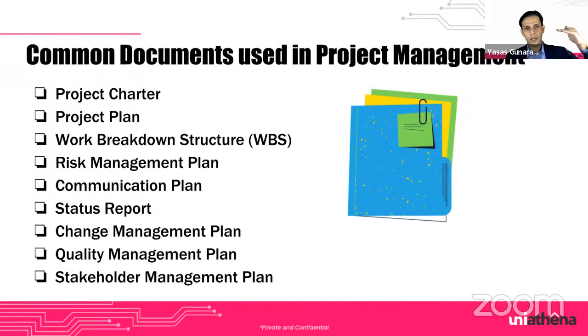So you would have a main topic, for example, project initiation, and project initiation would have breakdowns under that, saying initiation meeting, and under initiation meeting, you would have communication meeting, and so on and so forth. So you would have multiple breakdowns of your project tasks, and you would number it most of the time. A WBS would have clear numbers, so you can refer to a particular task item saying 2.1.11, and anybody could go to the work breakdown structure and know what exactly we are talking about.